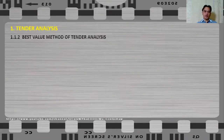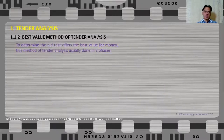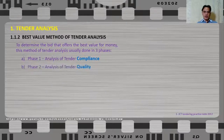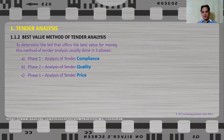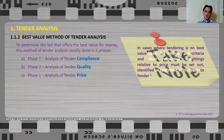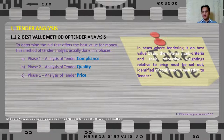The best value method of tender analysis is usually done in three phases: the first phase is the analysis of compliance, the second is the analysis of tender quality, and the third is the analysis of tender price. So price is only the last phase. We must note that where tendering is on a best value basis, the criteria, sub-criteria, and their respective weightings relative to price must be set out and confirmed in the invitation to tender.